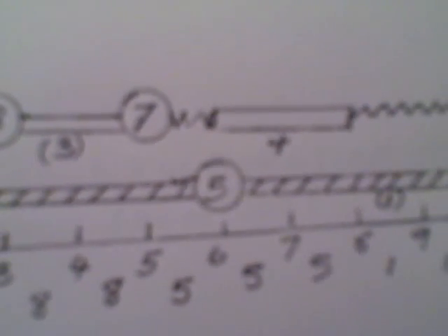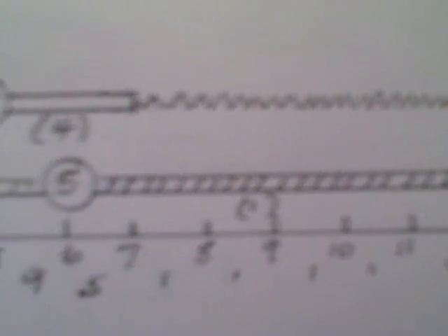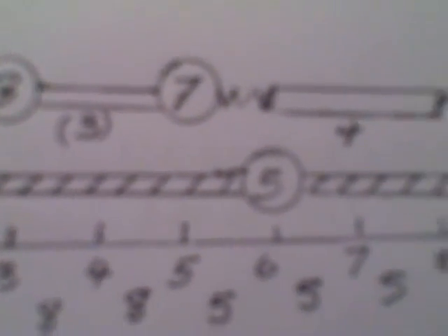So what I'd like to do is try to reduce that 9 to a lower number so that this has a smooth decline in resource demand as we move through the project. I've done a simple change here. I have redrawn this bar chart, and now I've delayed one of the non-critical activities. I can do that because this squiggly line in here is actually the float. This indicates how many days of float I have, which is 5 days. So I have 5 days I can use for other purposes, and I'm going to use one of these days right here. I'm going to delay that activity 7-9 by 1 day.